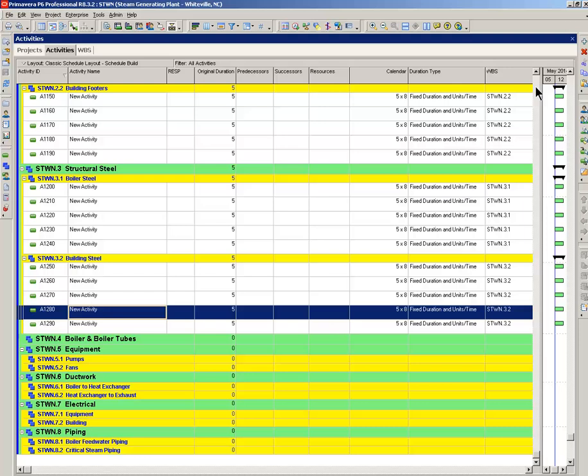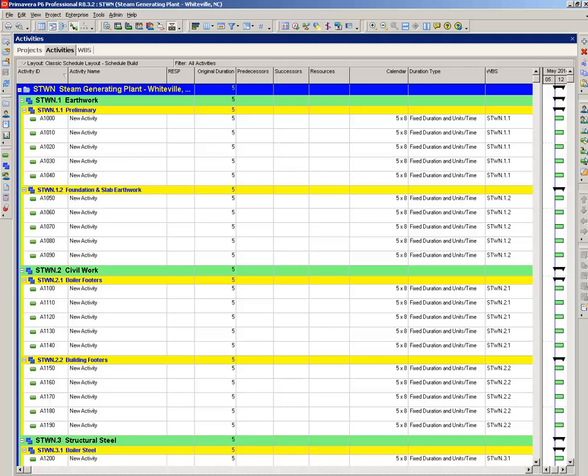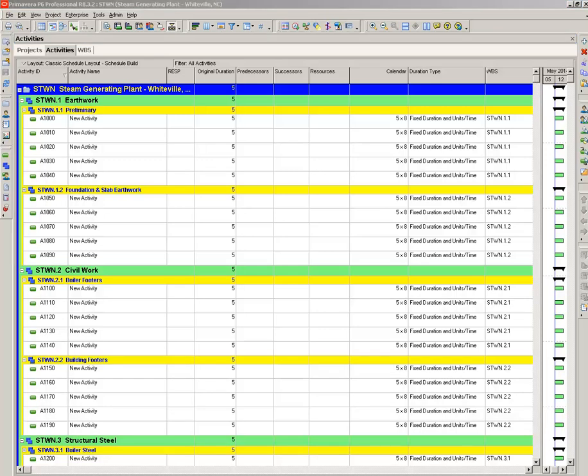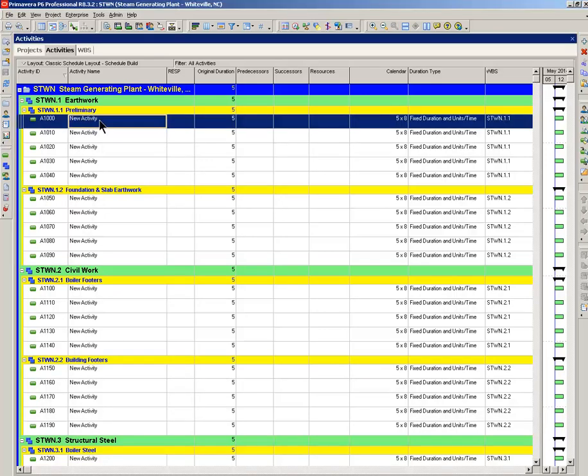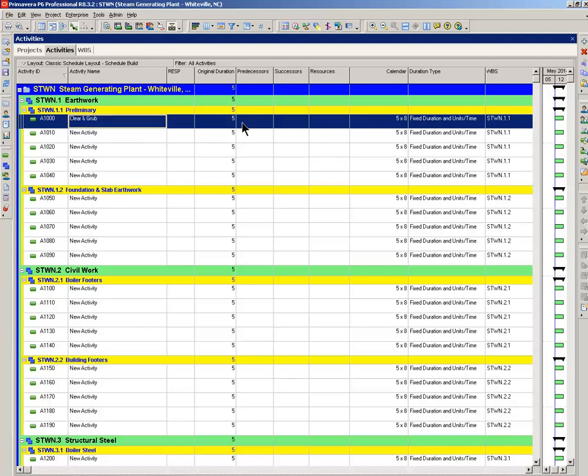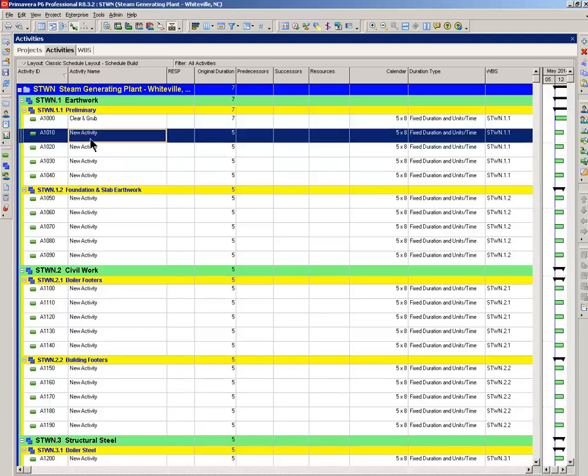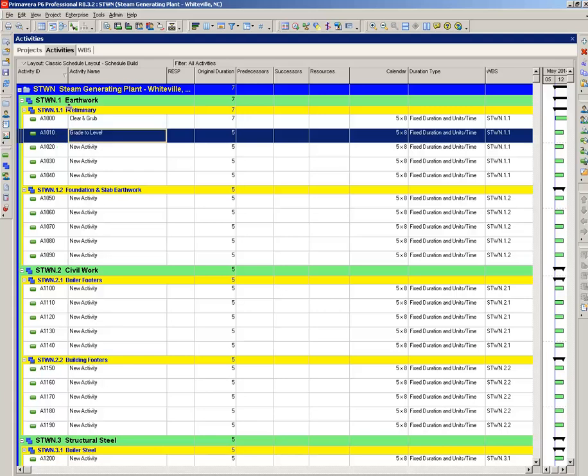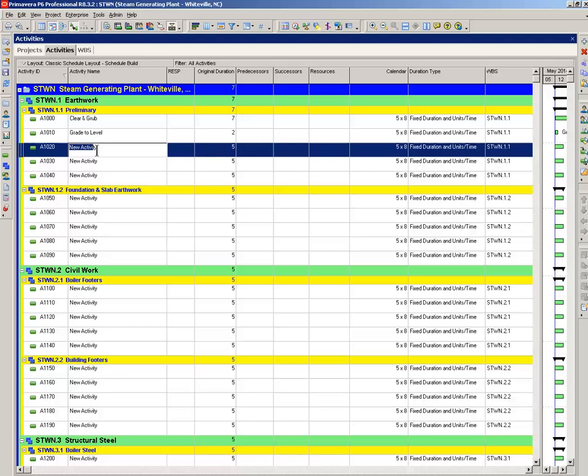Now, first activity on a construction site. You'd want to clear and grub. Get chopped down all the trees. Get rid of the garbage, beer bottles, everything else. Let's use seven days for that one. Next activity, grade to level. And that'll take two days. Small site. Next activity, preliminary survey. And that'll take us one day.